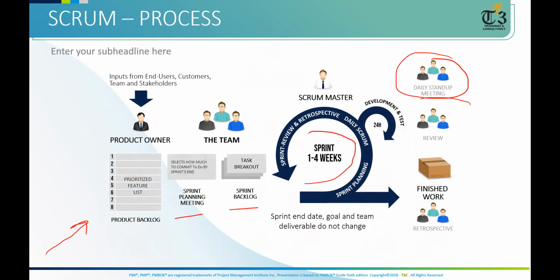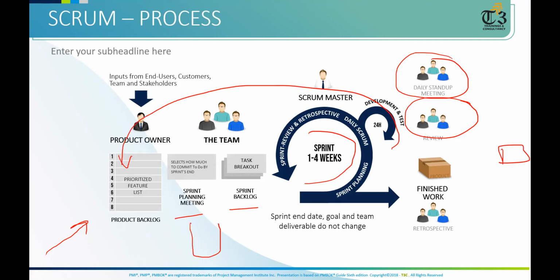Once the iteration is finished, we perform the review meeting. If in the review meeting the work is accepted, then we put it in a site as per the release schedule. If not accepted, we put it again in the backlog. Then it has to be prioritized. Then it becomes the iteration backlog, and this circle will continue throughout the project. After the review meeting, we may perform the retrospective meeting for lessons learned, correction, or continuous improvement.